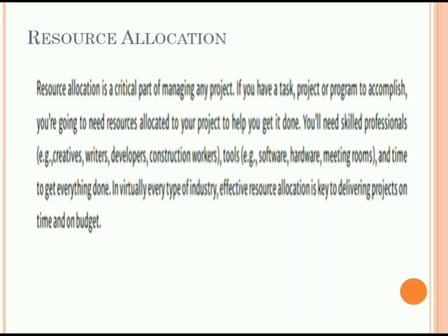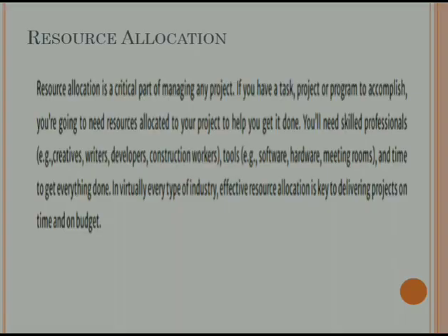The objective of resource smoothing is to complete the work or the activity within the required date and time, avoiding the peaks and troughs of the resource demands. A smooth resource profile is usually achieved by delaying some tasks or work. It will reduce the flexibility of the schedule when it comes to dealing with delays, but it is very cost effective in managing and using the resources.